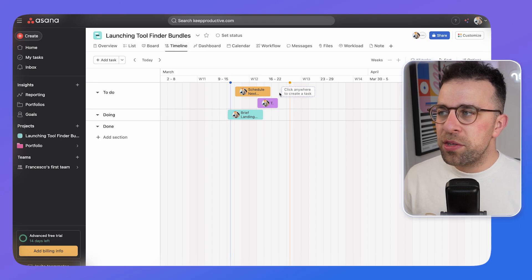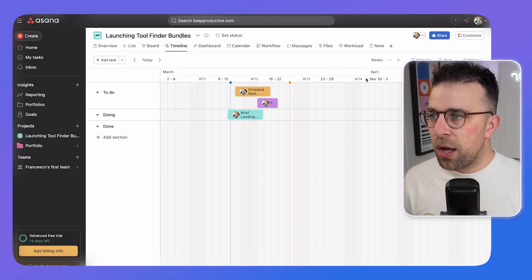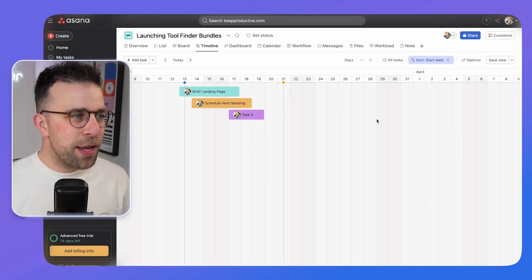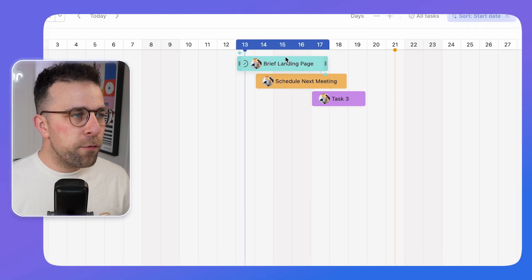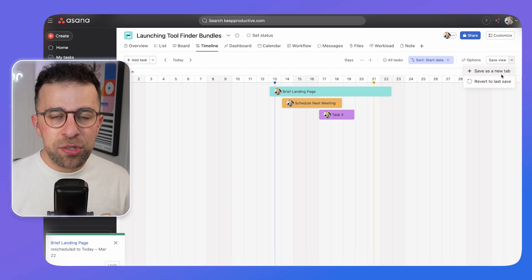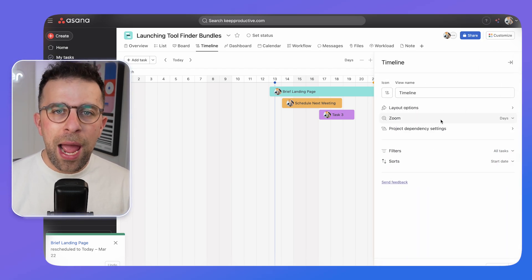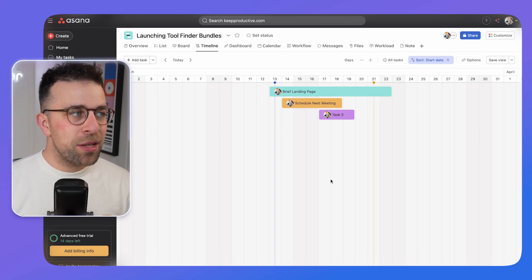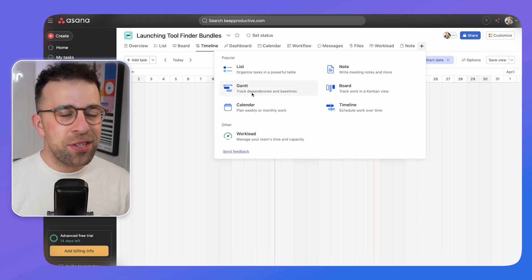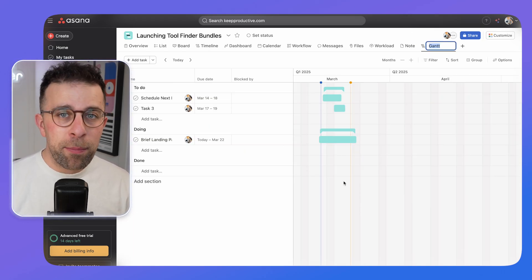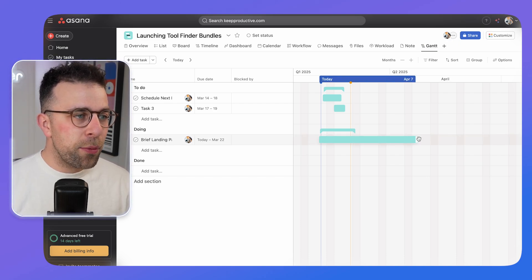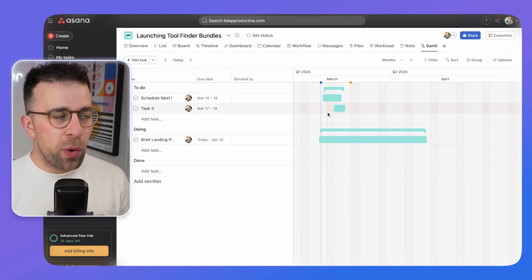You can also organize in timeline view, which is a great way to see tasks at a glance. You can narrow down to hours or go all the way to years, and modify project dependencies to effectively create a Gantt view. There's also a dedicated Gantt view option that's much more suited for tracking dependencies and baselines in a typical Gantt structure.